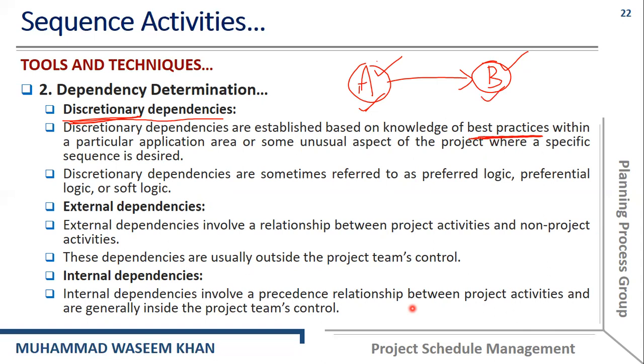That's why we call it discretionary dependency, which is established based on the knowledge of best practices within a particular application area. We call it the preferred logic, the preferential logic, or the soft logic as well.